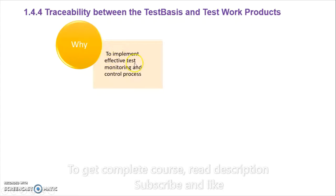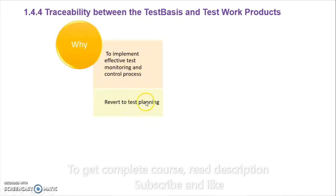The next point is reverting to the test planning phase, which depends on the monitoring phase. If we see that the number of test cases is more than what the time allows, we can use the monitoring phase to go back to the planning phase and change our plan by adding additional resources or adding more time.